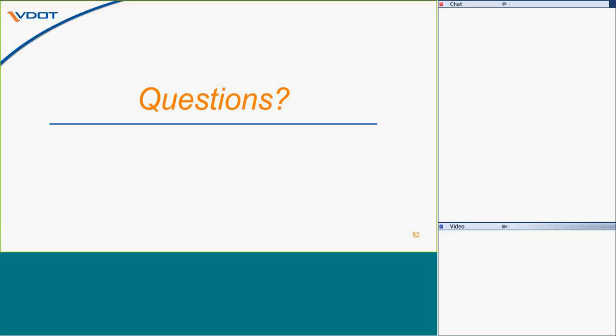So we're basing this year's program off the figures that we've had for the last couple of years in the HSIP program. And yes, there will be a call for projects every year. Our goal is to pass a 6-year program out with enough safety projects that when the funding becomes available, projects are ready to go without having to find projects for the HSIP program. The ones that we weren't able to fund this year, due to either financial restraints or eligibility criteria, we have as a backlog of safety projects on the shelf that we can deliver every year.